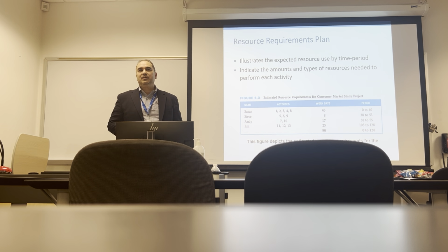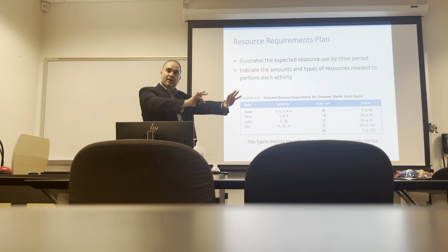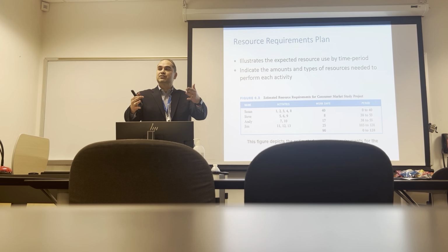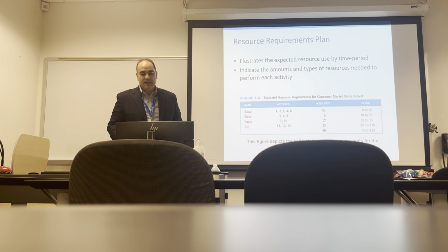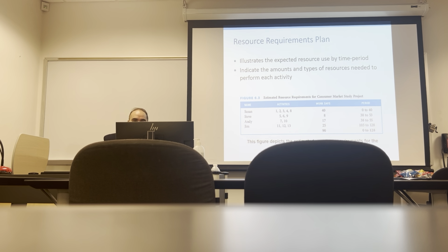So, for example, let's talk about the framing process, okay? So we're building a house, we got the frame. Can we conceivably start putting the roof on while the frame is being built? Well, maybe we bring in the parts, right? We bring in the trusses and the joints, and we bring everything in to get ready, so we don't have to wait for the frame to be finished. We have all the resources there. We have to find ways to cut time, lead time. We've got to cut that lead time. So we want to look at that and then build our resource plan to be able to accommodate the schedule. 38 days is a lot. Any questions on that?